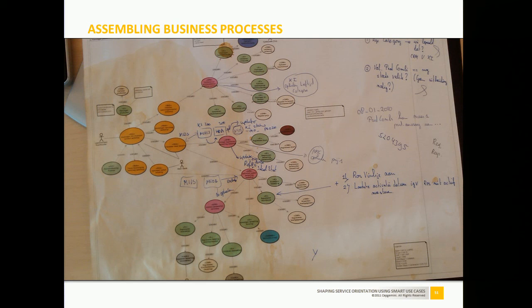So we said to the product owner, we can actually implement your new business process, but you have to give us an additional iteration. And he said, okay, that's fine. He knew what it cost because he knew how many hours it took in an iteration. So he said, okay, if there's this amount of money, do that. So we did that. We got an additional iteration, and we implemented the additional 5 use cases, and it worked fine. Actually, the project was a big success.